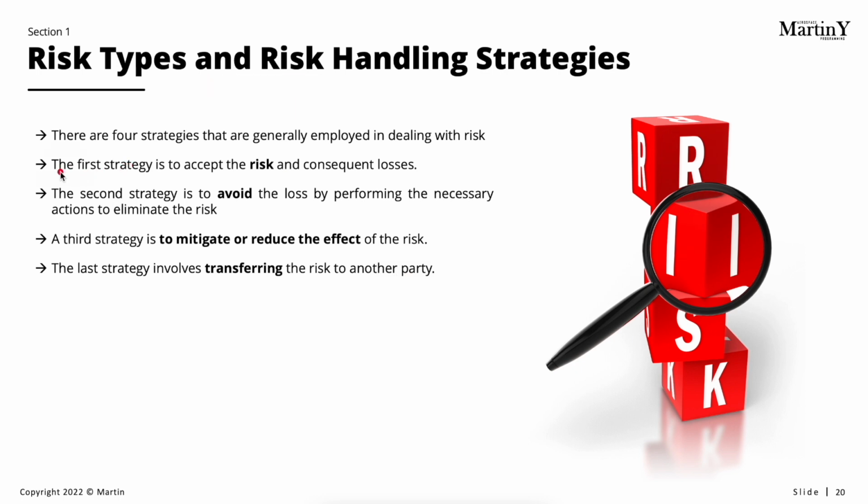So let's first talk about accepting the risk and the consequent losses. This is one of the most common approaches that are used out there when you are dealing with risk, especially with risk that rarely occurs. Some risks just are not worth enough for you to invest any resources in dealing with them. So for that reason, many risks might pass the corporate risk management functions because the cost of addressing those risks simply cannot justify the potential cost or harm from that risk in your company.